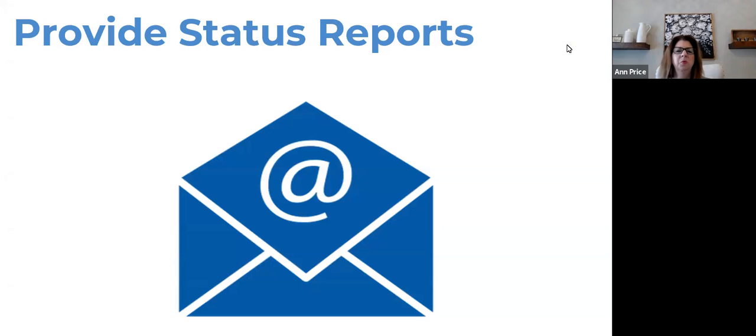So providing status reports is a great thing to do. We're doing this with one client where we're doing quarterly status reports. And what I did is I literally took the deliverables that we had achieved in the first quarter and said whether or not it was completed. Most everything was completed. There were a couple of things that were in progress. So it wasn't super wordy. It wasn't really long. And I just provided this as an attachment in an email. You could also do a status report in an email periodically, but you might want to have that conversation too, in terms of how often do they want a status report and what does that look like? Is that a monthly thing? Is that a quarterly thing? That really helps prevent some of the things that we're talking about.